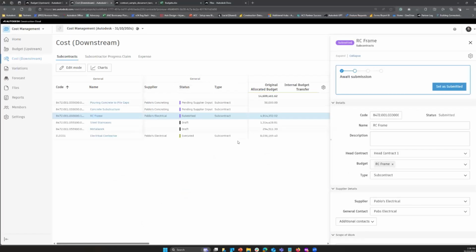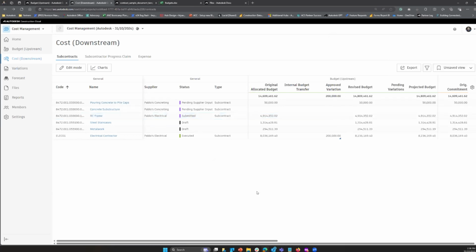Okay. Now these workflows are all determined in the back end of the system, which you can modify. It could be one, two-step, three-step group approvers. You can even have certain contracts that reach over a certain threshold in value be approved by a different group of people as well. And you can create multiple workflows, so there can obviously be multiple workflows with different conditions if needed. Okay. So I'm going to go ahead and refresh this page real quick.